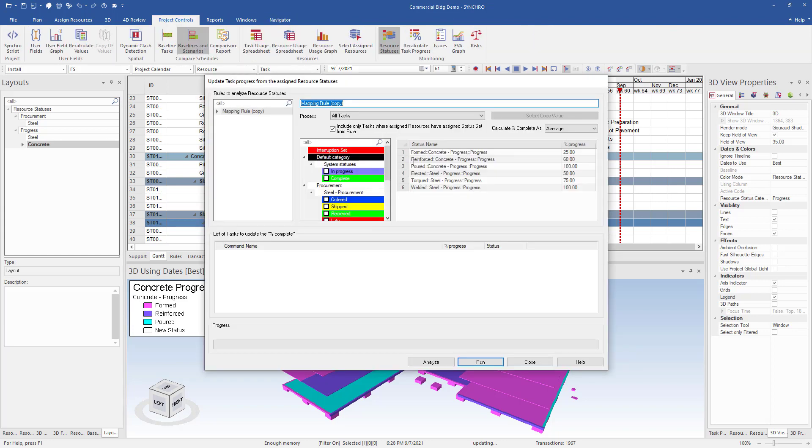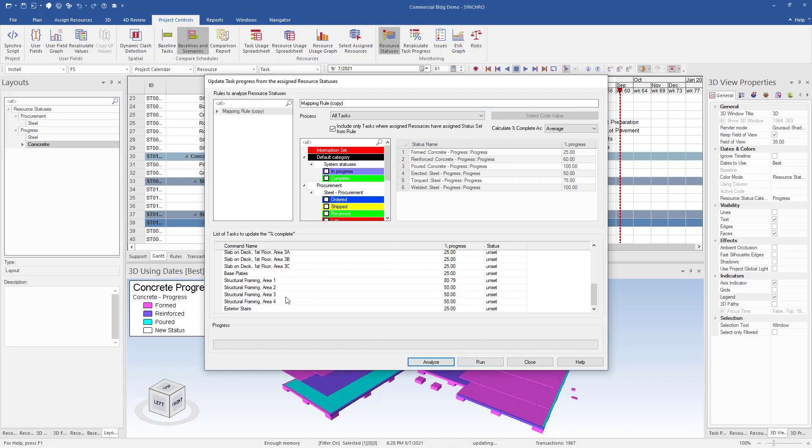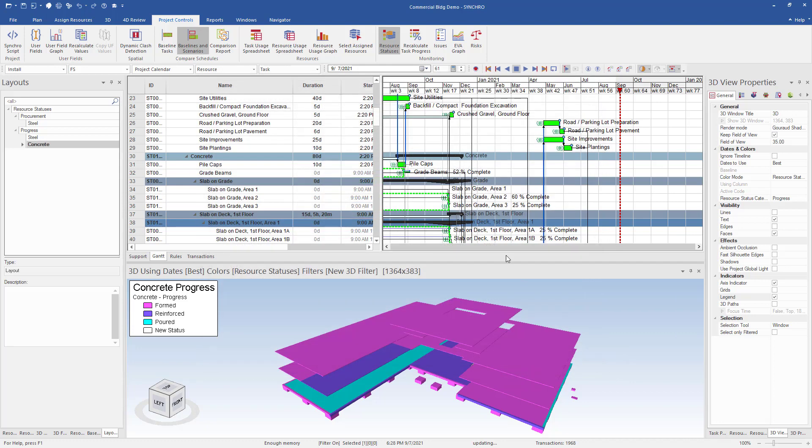Now in the recalculate task progress screen, we can analyze the progress updates from the field. As a scheduler, I want to do a quick audit to ensure everything looks accurate and select run to update my schedule. We can see in the report that my slab on grade area 2 task has been updated to 60%. And when we look at the Gantt chart, we can see it has been updated there as well.